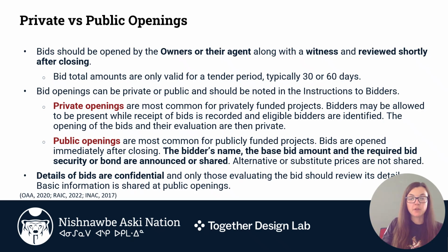Private versus public openings. Bids should be opened by the owners or their agent along with a witness and reviewed shortly after closing. Bid total amounts are only valid for a tender period, typically 30 or 60 days. Typically, for housing projects, you want to ensure there is a quick turnaround when opening and evaluating the bids. Bid openings can be private or public and should be noted in the instructions to the bidders.